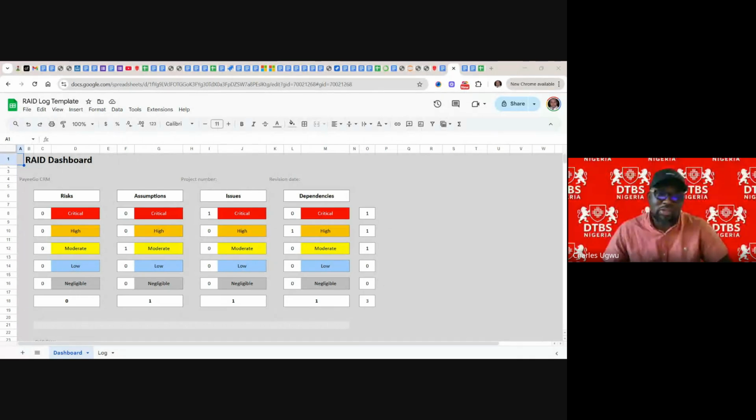And describe the scenario very well, how it affected the approach. What you are going to use is a form, or title, called exceptional circumstance in project management. Once you use that, they should be able to give you a listening ear, and they should be able to augment the budget for you. They might decide to give you a supplementary budget. Even in government, they give supplementary budget. But you have to raise it as an issue, describing it as an exceptional circumstance.